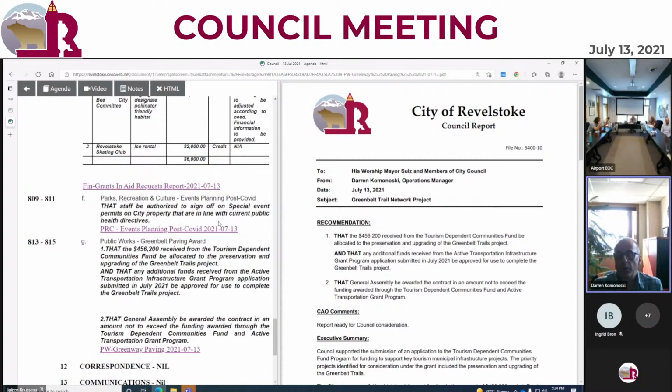But knowing that, we thought we would try to mitigate this budget and get as much done as we possibly could. If we do get approximately 700, I believe that we could go back to the contractor and get 99% of this done, in my opinion. So that's kind of where we stand. The unit prices all came in very high, obviously, so that was unfortunate. But with the supplement of this 250,000, we could still carry forward and get most of this project done. Great, thank you. Okay, let's get the motion on the table, and then we can have further discussion if need be. Someone bring it forward, please.